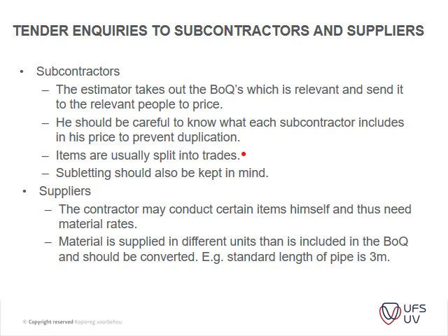So just have a look. If you clarify it with the guys that are putting out the tenders, you can actually get a bit of a competitive edge there, because then you don't have to put in contingencies twice. Okay.